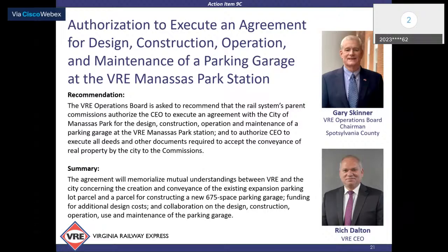And then, of course, once we get back to the 60% design level, VRE will take that to a 100% design level and complete that, prep the design work for construction. And just as a reminder, we did receive funding through the NVTA for the design process. So at the point that we get back to the 60% design level, we'll utilize the money from NVTA to complete that design. I'll also emphasize that through this process, NVTA, of course being the primary funding partner for us on that, we met, collaborated, and NVTA is fully informed of what we're doing here.